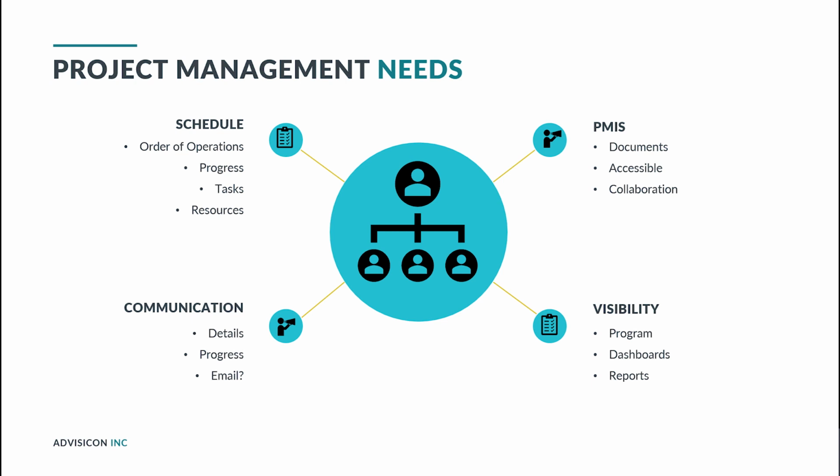The schedule should show the progress of those tasks. Some scheduling software has progress as simple as not started, in progress, or completed. Or is it something more granular, like we are 53% complete, that specific? Or we have completed 6 of the 24 hours.